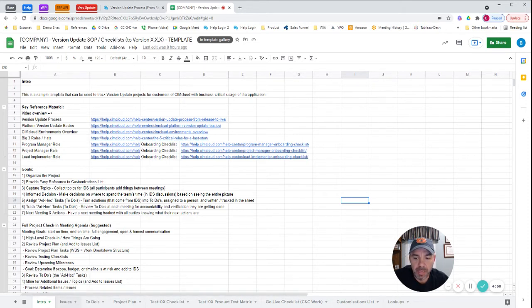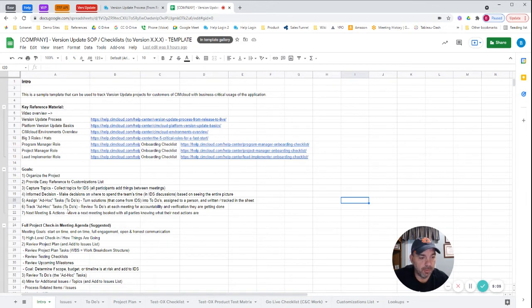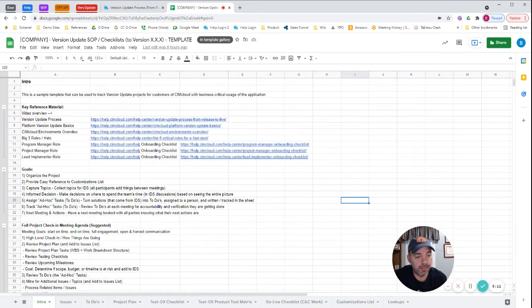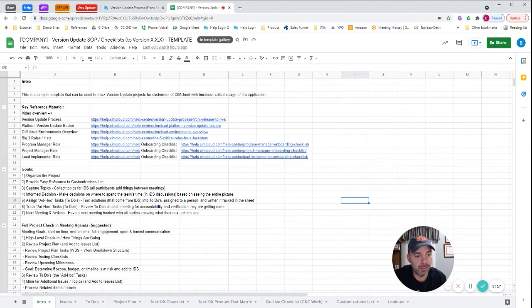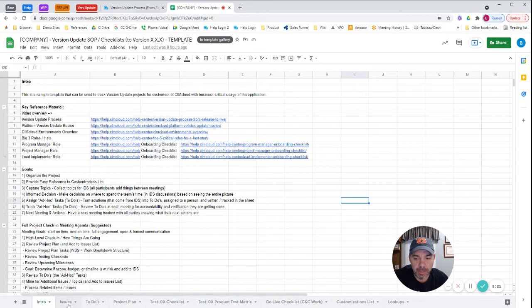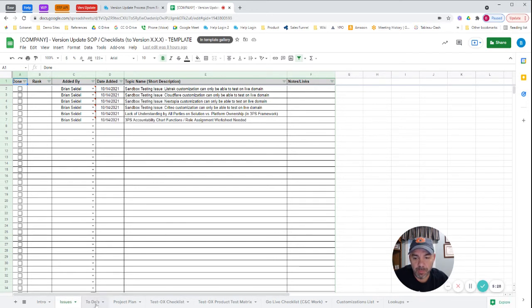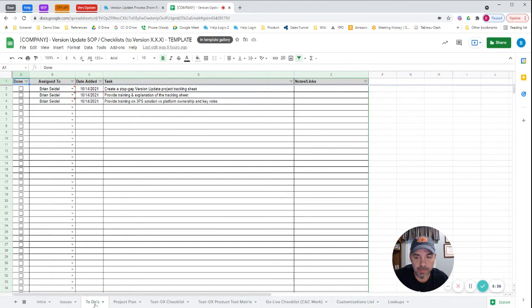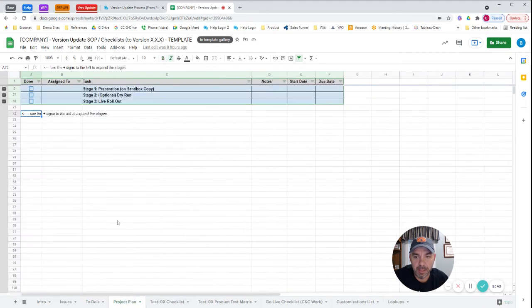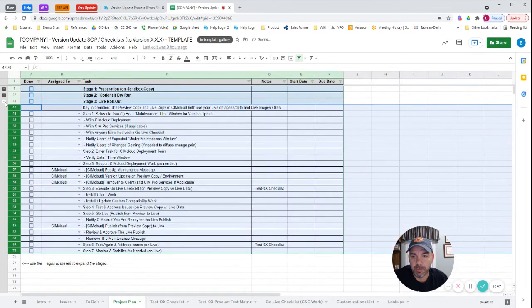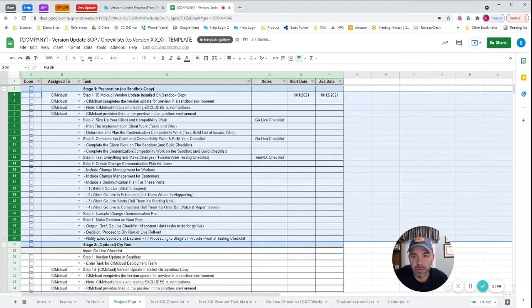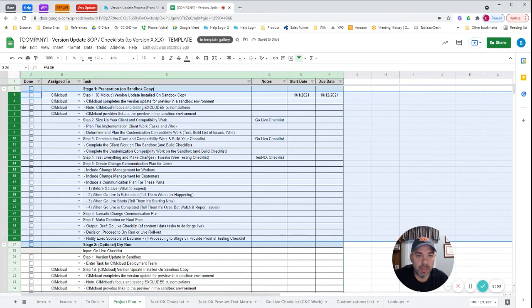Effectively, what we've got is the first couple things here. There's some goals listed of keeping the project organized, making sure nothing's getting lost or forgotten. That's the job of the project manager, to make sure there's a clear goal. You have all the resources aligned, you have a plan for the project, and then as stuff comes up, you're addressing issues and turning that into action items with accountability to get it done. So we recommend keeping an issues list that are added with people addressed on who's the issue. This is going to be discussed and decided on and either resolved or turned into tasks during the discussion. The to-dos are tasks lists that are action items that are being completed on the project. And then the project plan is basically, we have a default project plan based on the article I just showed you.